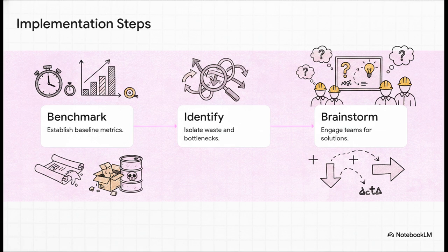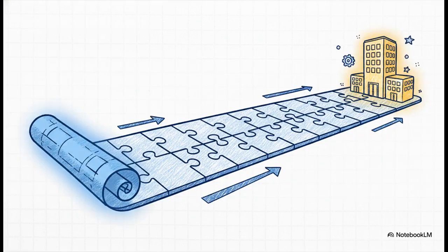This is where facilitators get the actual project team, the people on the ground, engaged to pinpoint specific, actionable problems that are killing your workflow. And here is the beautiful part. Once you've analyzed your current state and found those deltas, you don't just complain about them and move on, you design the future state map. This becomes your blueprint. It visually outlines the absolute most efficient way to complete the process.